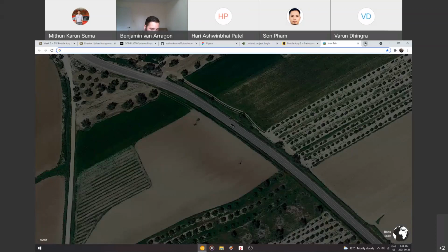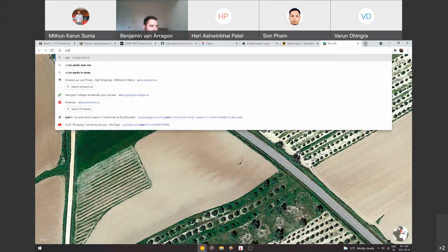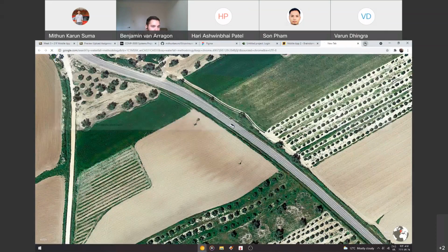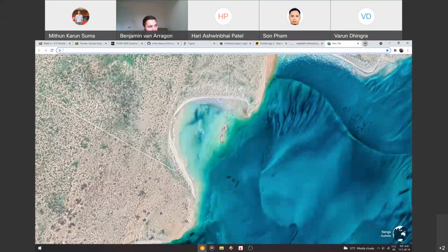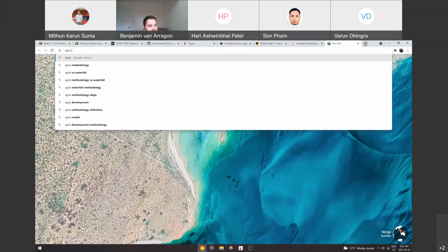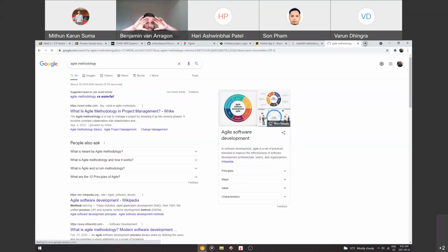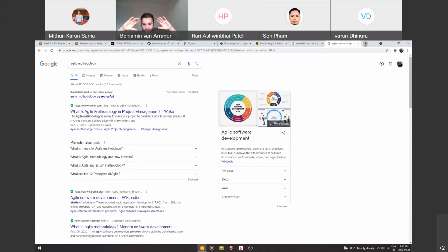I'm glad you actually mentioned the waterfall methodology there. So I'll show you guys what that means and what he's talking about. But basically, like he said, it's this continuous development. So you guys are always working, always coding, and you have what we call 2-week sprints, which are 2-week development periods.